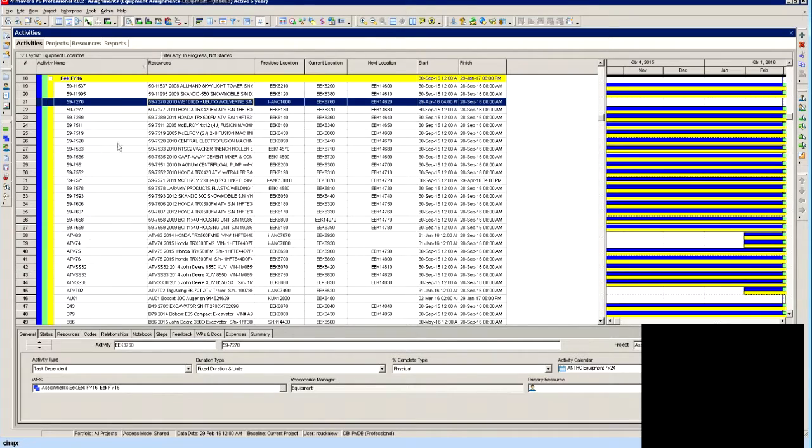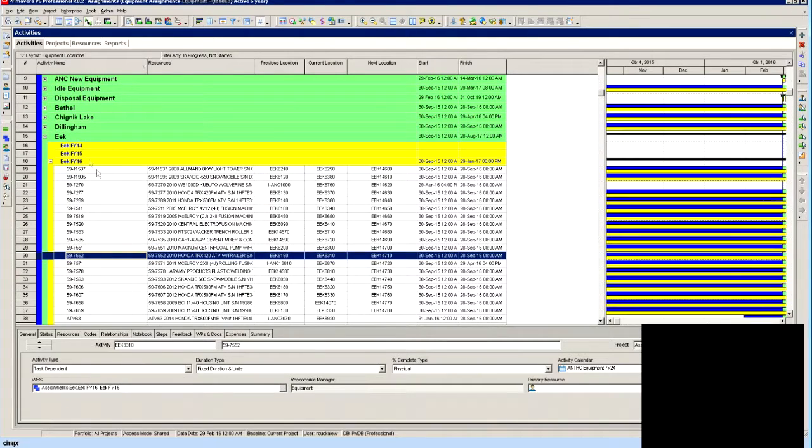When you first add the very first activity to this WBS, you need to rename the activity ID with the first three letters, in this case EEC, for what you want it to be. Every activity added after that will start with EEC and it will increment by 10. In this case, this is how it's set up to be an increment by 10. The reason to do that is when you track the location of a machine and you move it between base places on this schedule,